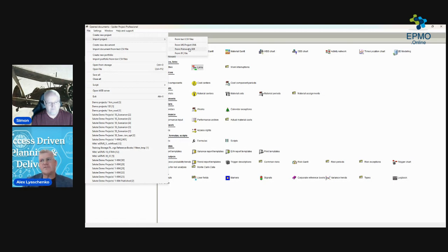So the idea of success-driven project management is that you're not producing a schedule for a new project each time. You are breaking projects into small parts. Each project is unique, but the uniqueness of each project is a unique combination of non-unique components. So when you're developing a project, you create these non-unique components, and then, like Lego, you take a new project with already existing components and do scaling.